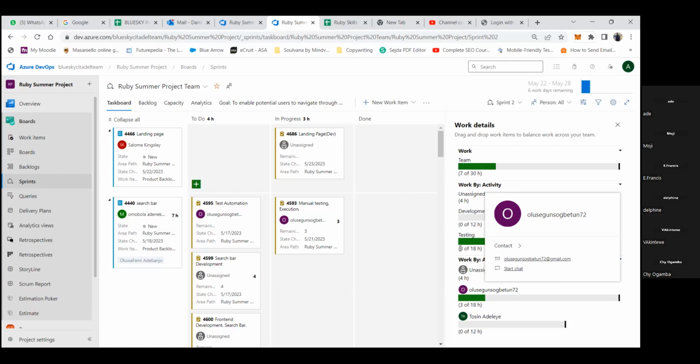So he's saying that Segun has, as at today, a capacity of 18, and out of that 18 he is using a 3. But like I explained earlier, if he puts a 15 or a 10 for his manual test, and puts a 25 for his automation, it's going to turn red. That's bad. And what that red is saying is he has overestimated more than the capacity. It's like you're carrying more than your weight. That is what that would have shown him.